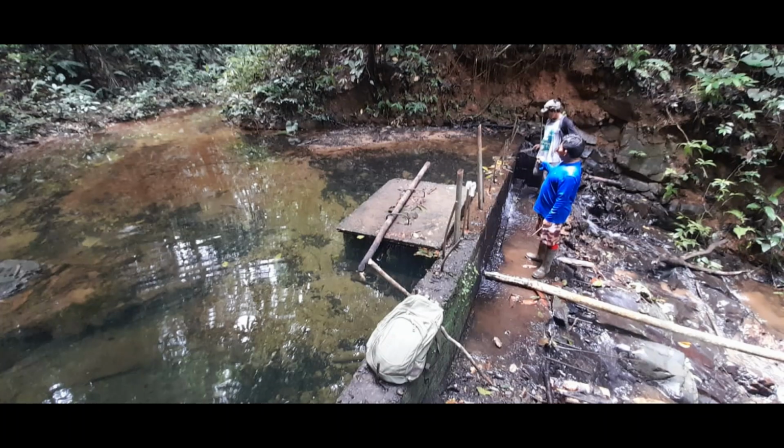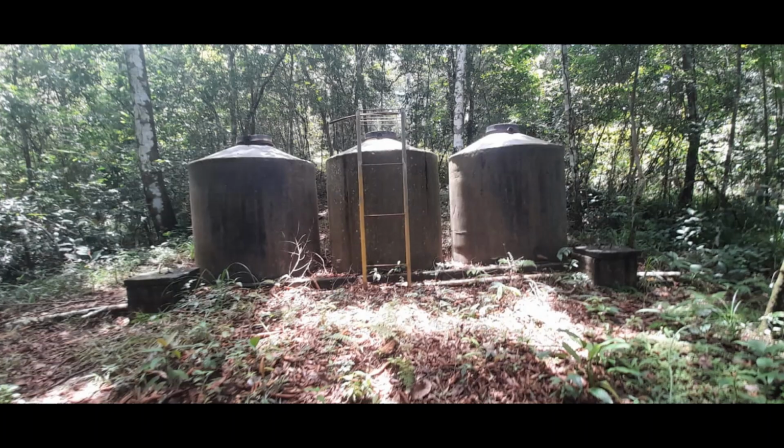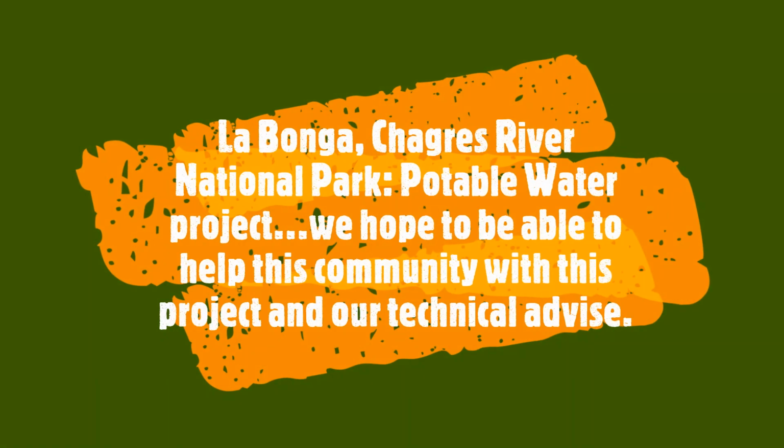The water storage tanks are serviceable, but the manifolds and piping need to be reworked. The water treatment tank and the process have been suspended and will need to be replaced. These will all be considered in the scope of the work and the estimate of the project. There is infrastructure available, but some of it will need to be completely redone. Footprints looks forward to being technical advisor on these important